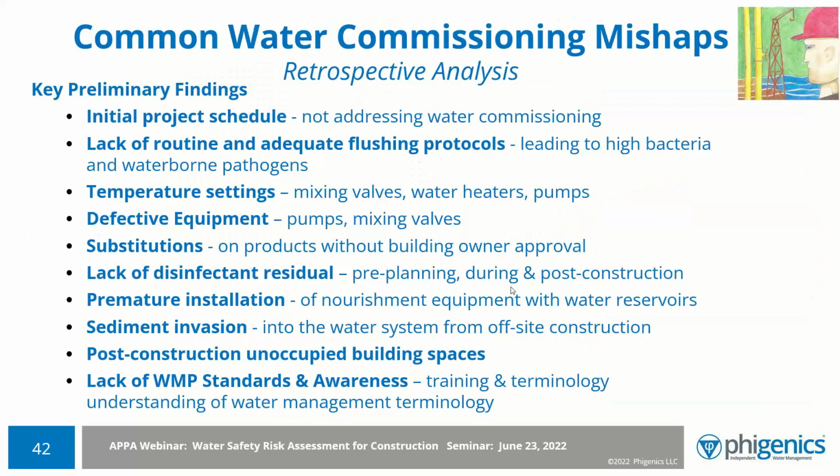So what have we been finding out by commissioning and mishaps, and what could help you? If you're just wanting to get started with some simple things, if you have a project schedule that includes these water activation dates or what's going to happen, you're going to be 90% of the way to having a better project. That's what I found. It's just opening the conversation and talking to people about it on your project. So get a schedule and get those dates on about how the water is going to be activated.